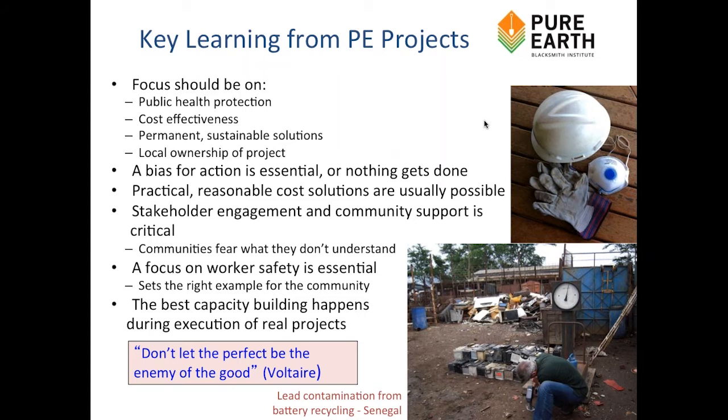It has happened that you have found some more significant lead contamination. You then need to go look at your risk evaluation. What is the exposure pathway that is of most concern? When we do that, as I said at the outset of my discussion, you find that the soil ingestion pathway is so dominant that spending money on the drinking water, potable water, is not money well spent.